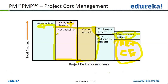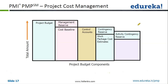Always remember, cost baseline is not a project budget. Cost baseline equals budgeted actual cost — BAC. BAC plus your management reserve gives you a project budget. This is another slide I wanted to cover before discussing those inputs.